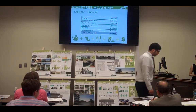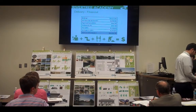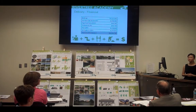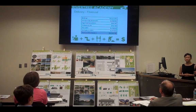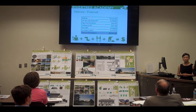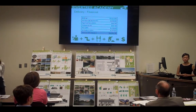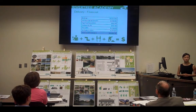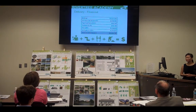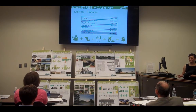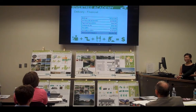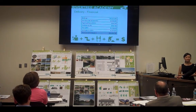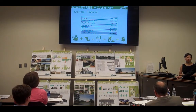Beyond the total cost of construction, there are other costs associated with this project, including site improvements and soft costs such as engineering and architecture, as well as overheads and contingencies. The projected total cost of development will be $22.5 million.